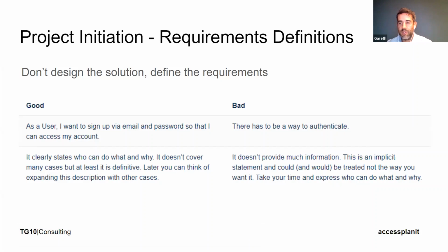Functionality describes itself a bit more, but the way I often see it is, if you've mapped out the process behind whatever it is you're looking to build, that gives you your big functional chunks, and then it's making sure the requirements map to those chunks.